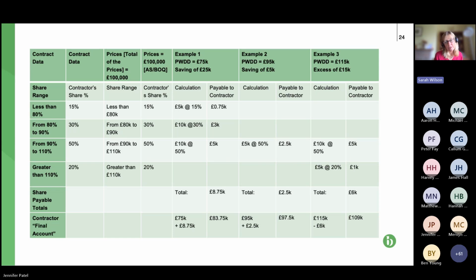But what I'm also seeing more and more is a situation where the contractor has to bear all of the pain once it gets into a pain situation, maybe 110, 120% of the target cost, which I don't quite understand what the argument there would be.